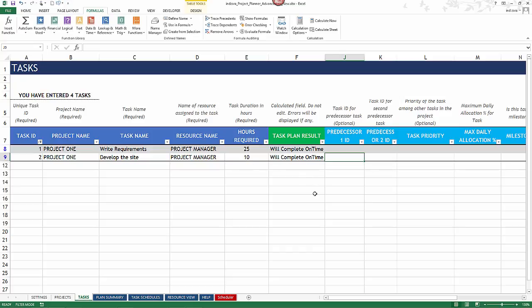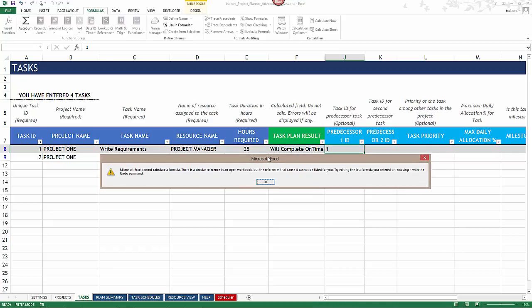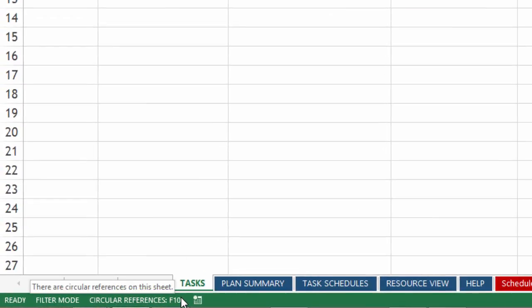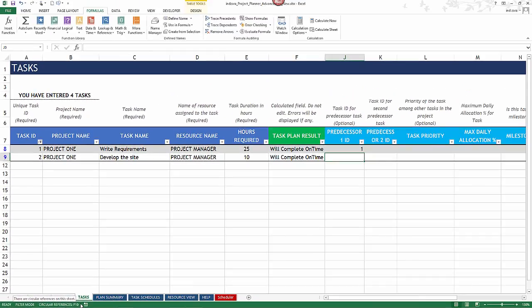We'll cover a few different scenarios where the circular reference error might happen. Starting with a basic example: if task one is dependent on itself, you get this circular reference error message. After hitting OK, you'll notice the circular reference is still shown in the bottom status bar, meaning calculations may be incorrect while it persists.